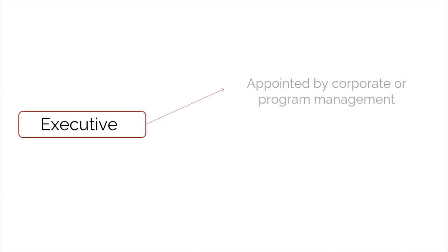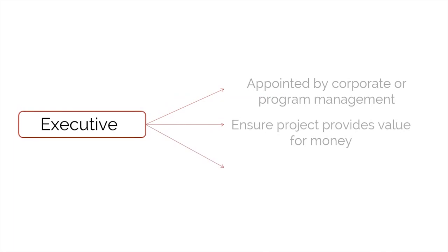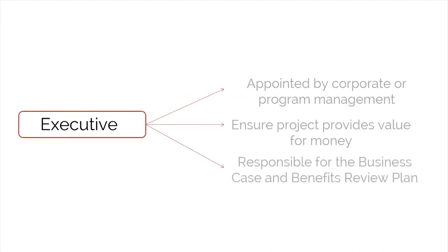The executive is responsible for the business aspects of a project. He or she ensures that the project provides value for money. The executive is responsible for the creation of the business case and benefits review plan.